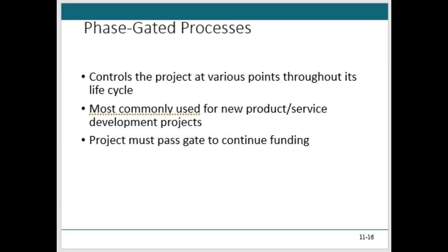So these series of gates or checks are planned. And this is where I might do Lean Six Sigma, which includes the define, measure, analyze, improve, and control methodology, right? That's frankly Deming's approach. Six Sigma is Deming's approach to plan, do, check, act. Six Sigma calls it define, measure, analyze, improve, control. So I might do this in each of the 5 phases, and that is going to serve as my project milestones. So I'm tying my milestones to the end of each project phase, which in turn is frequently used as a toll gate for the next phase.